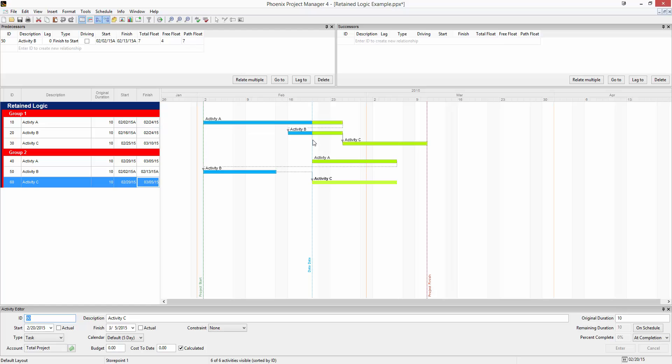You can see activity C is now starting not after activity A, but back here at the data date, as early as it can. And same in the example of group one, activity B is no longer waiting for activity A to finish. It's all just getting done as soon as possible.